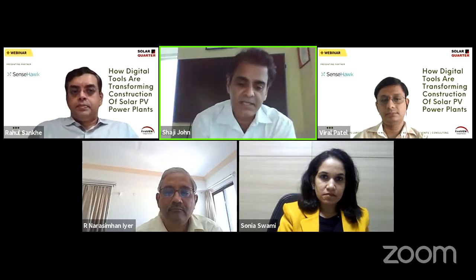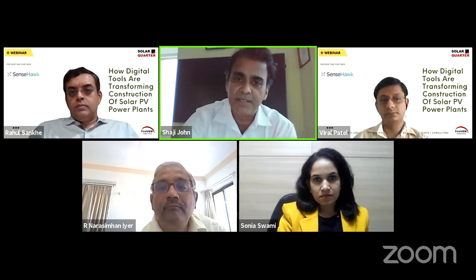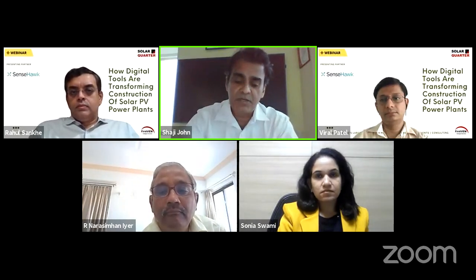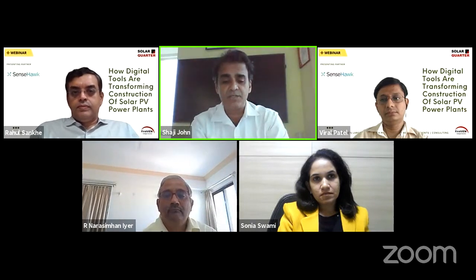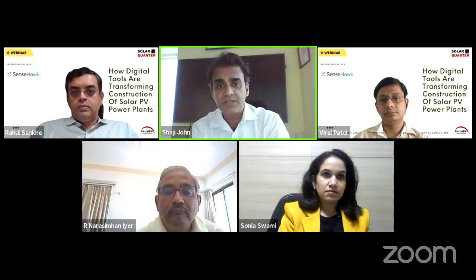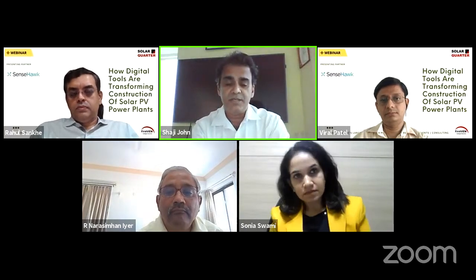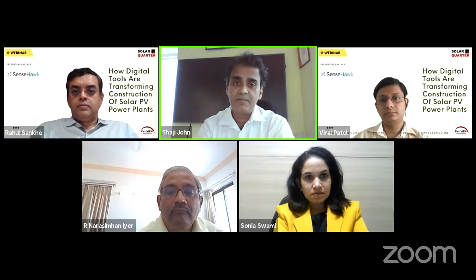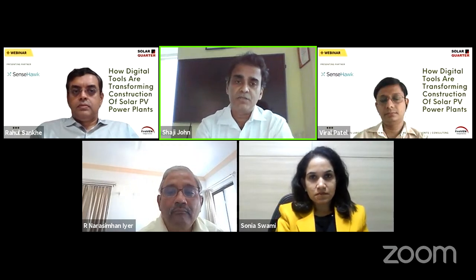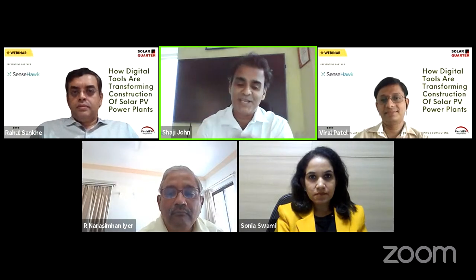So, industry needs. Like Rahul touched upon in the beginning, the scale of the plants is going up. Today we are talking about some of the projects, especially in the Middle East, that are 1 gigawatt to 3 gigawatt scale. That's the range of projects we are in discussion about with various customers. And the timelines are not very big. They are still in the range of 18 months to 36 months for this 1 to 3 gigawatt, which means that you are under time pressure.